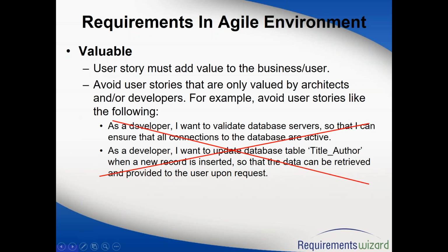So you should never write a story which looks like this. As a developer, I want to validate database servers so that I can ensure that all connections to the database are active. If you give this story to your customer or your product owner, for him or her, this doesn't make any sense.